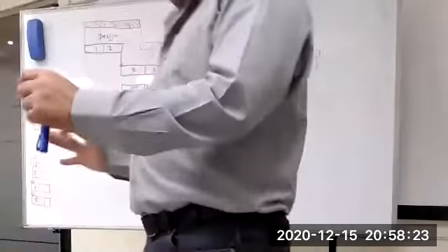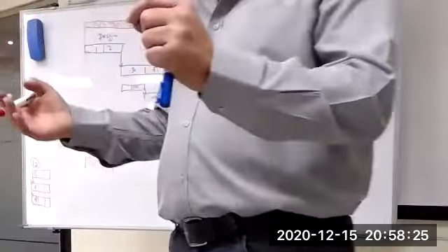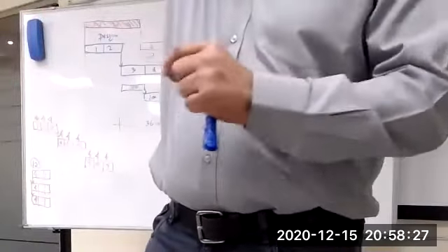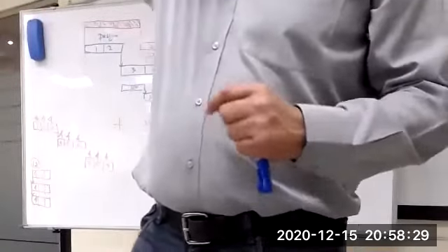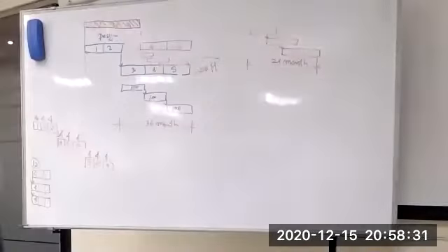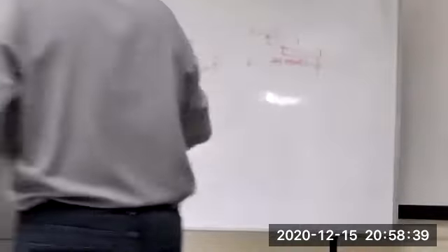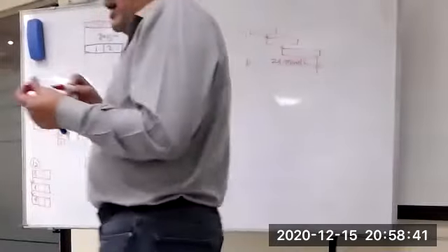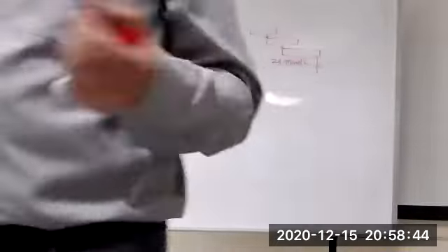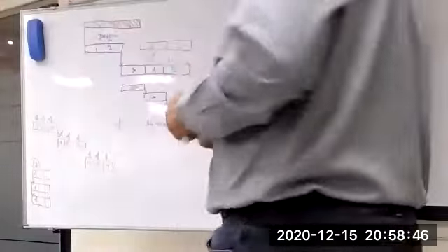So now you are increasing the resources, and this is not estimated. Okay, so crashing, cost. Fast tracking, quality and safety. In our exam, this is what we have to remember. Resource leveling, the efficiency of using your resources.